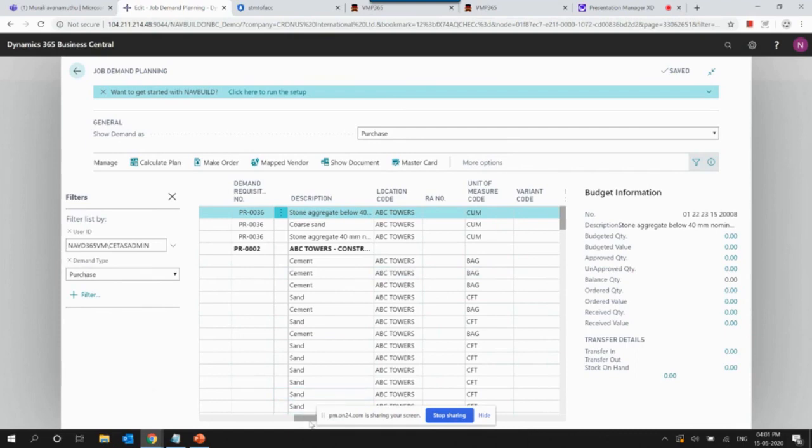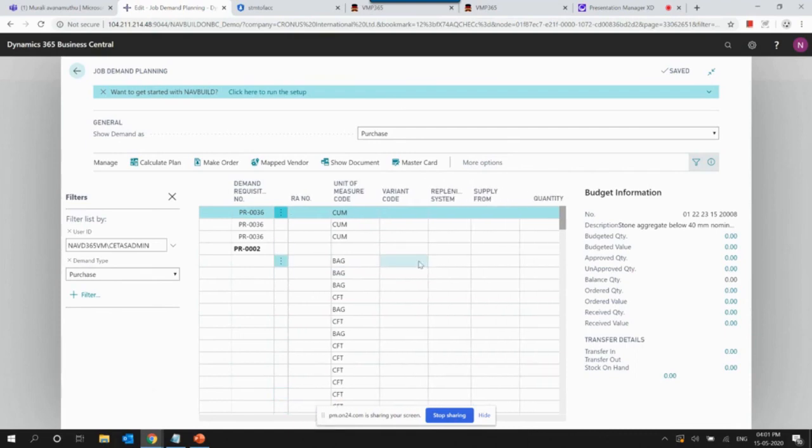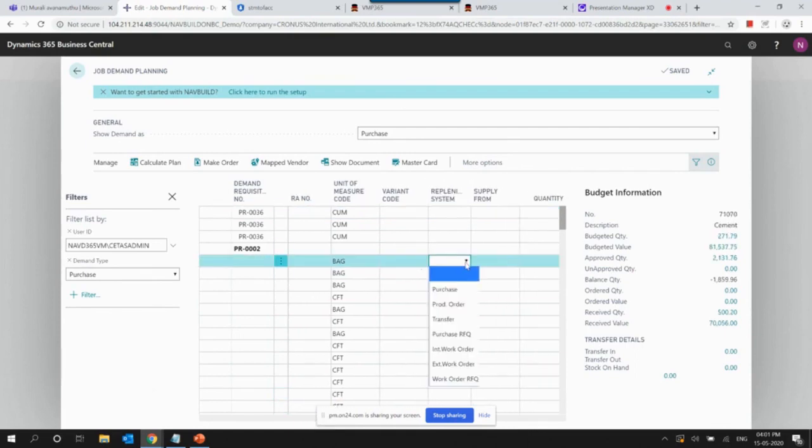As an option for the procurement team, you could see various processes like purchase order. Let's say, for example, there could be rate contracts which we have agreed with a few suppliers, let's say for vendors managing steel, sand and cement. If you have rate contracts agreed, you can directly release a purchase order.